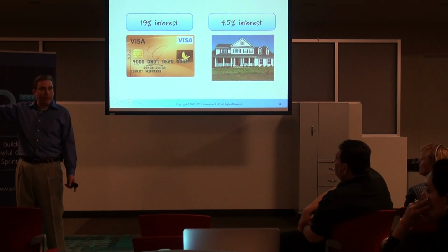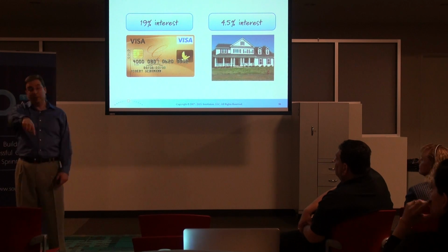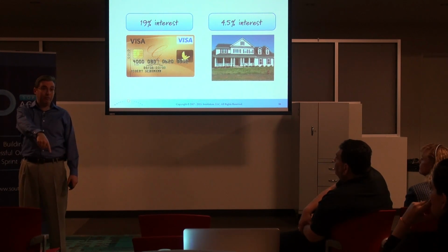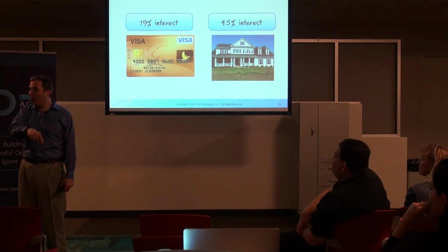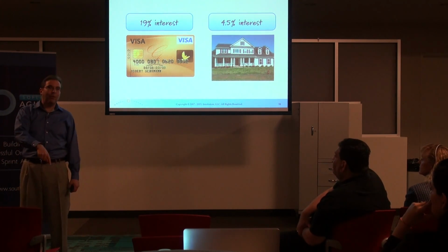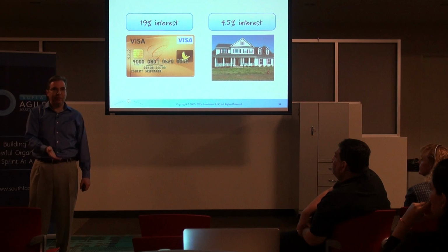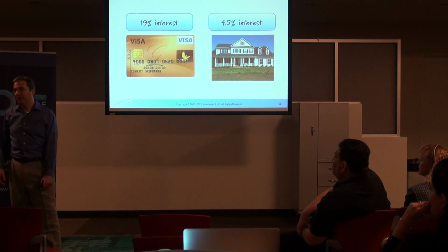I may never pay that back. On the other hand, this thing right over here, this module that we go into every single day, have to make changes there all the time, have to dance around all those shortcuts. We're paying a lot of interest on this one. Pay that one back first.